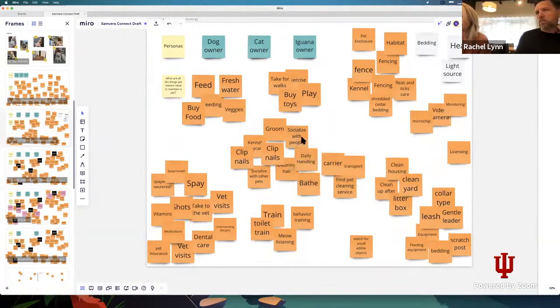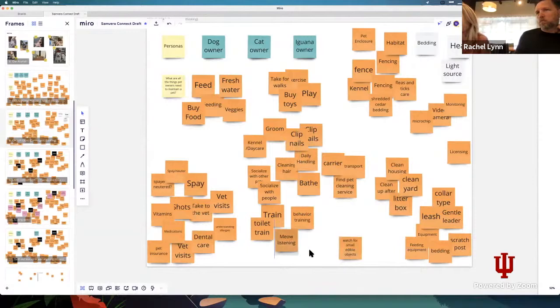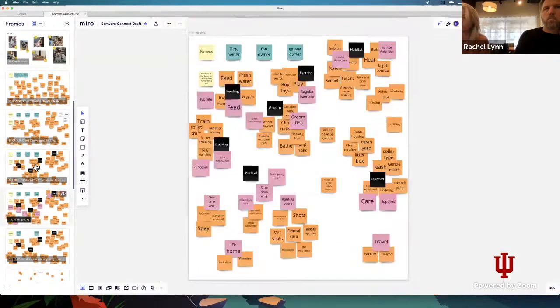So the goal here now is to put all like ideas together. Outliers might have their own separate space. But eventually we will start to have a structure around the themes, and themes will emerge. So labeling is useful in that. We like to also use verbs whenever possible. This just helps us stay connected to the action and the user value.